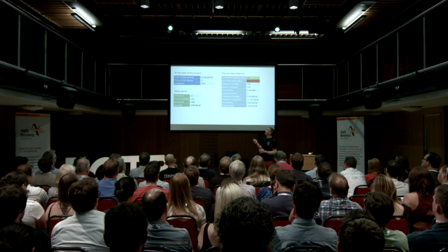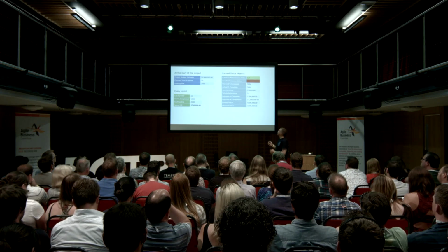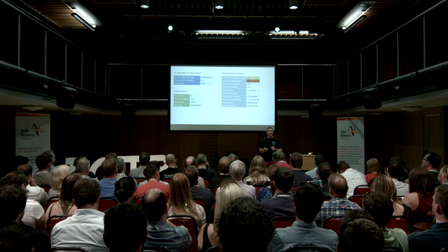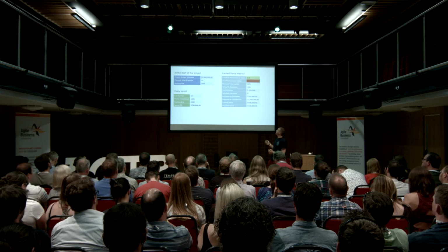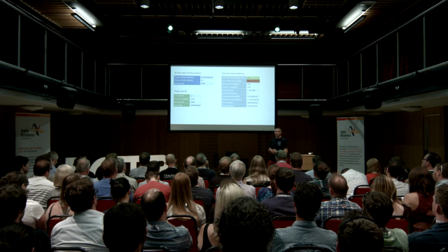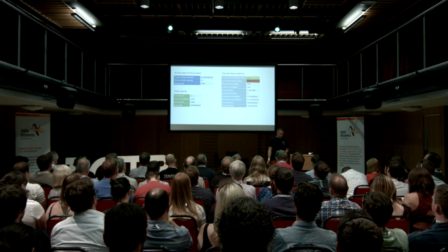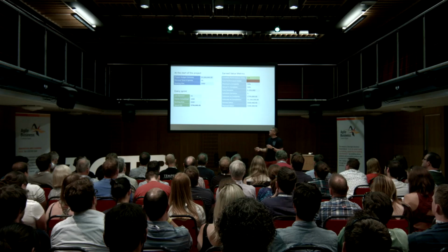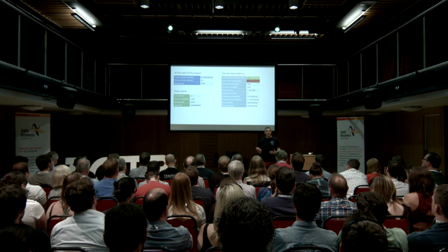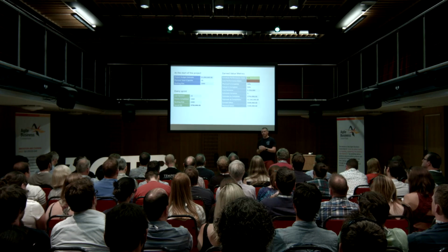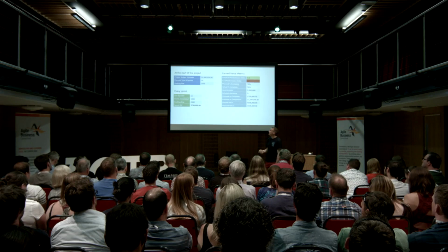So this is showing that we've got a CPI of 0.5, and it's also predicting here we've got another $750,000 to spend to complete the work that's remaining, and that gives us our budget's going to jump up to $1.5 million. So in all these examples so far, we haven't changed how much work we're expecting to deliver. So this is just really showing progress against some baseline.